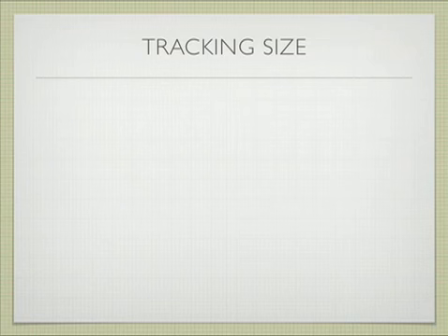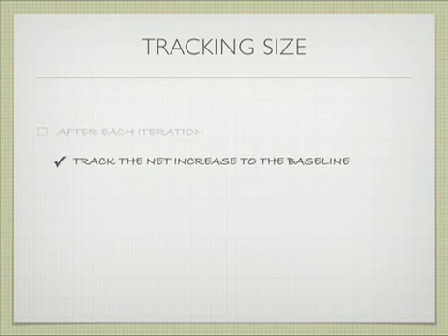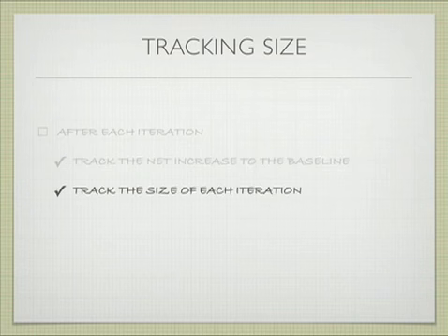Tracking the size. You should track the size after each iteration, track the net increase to the baseline or the application you're installing, and track the size of each iteration.